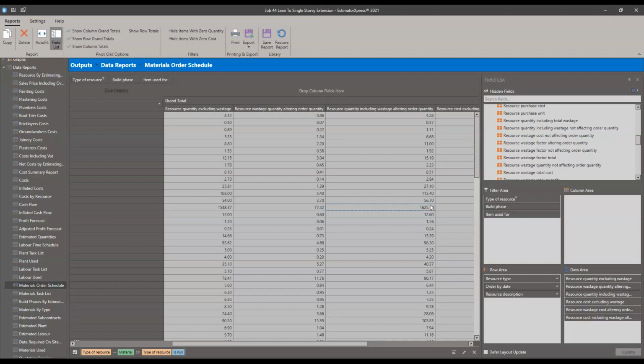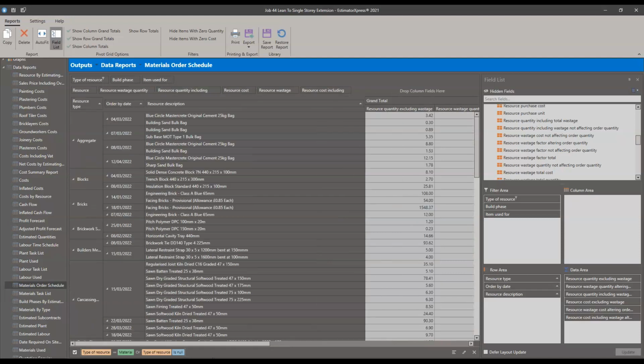So as long as I can keep them somewhere on site, keep them safe, I've got somewhere to put them, maybe a driveway. I've got to put the blocks on there as well, and whatever else gets delivered. Or you're keeping them in your own lockup, or you've just ordered them in bulk, and then you can use the dates on the start of the build phase to say they need to be delivered by here, and order and organize with your merchant your bulk purchase of the material, but then it's incremental delivery. So you're gaining that information out of this.